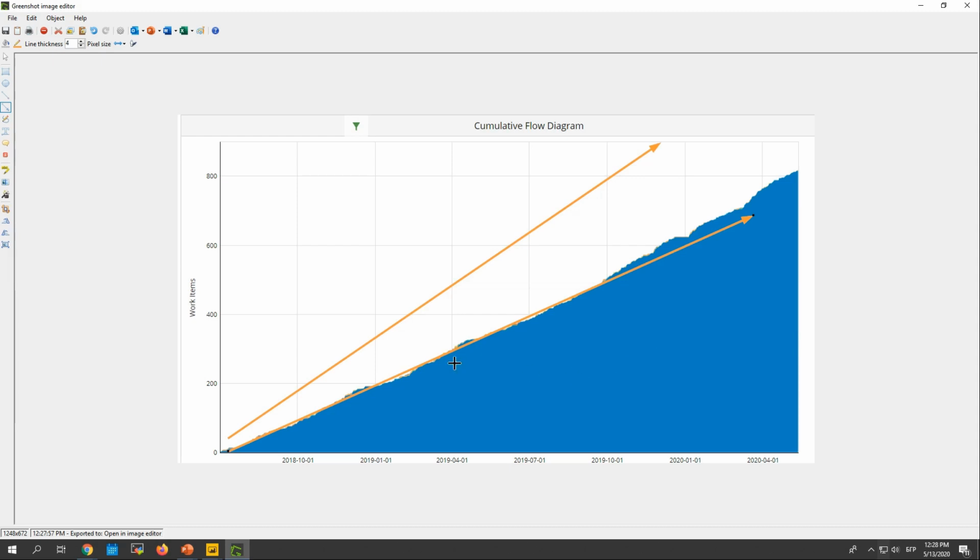Well, we already talked about this horizontal line here. It was the approximate average cycle time. So right here, the approximate average cycle time was, I don't know, 10, 12 days or something. Here, the approximate average cycle time is now almost a month. It's a month and a half here. It's 2 months here, 3 months here. And as you see, it's always growing. If you allow more work to get in than work gets out, then you're getting slower, and that visualization shows it, proves it.